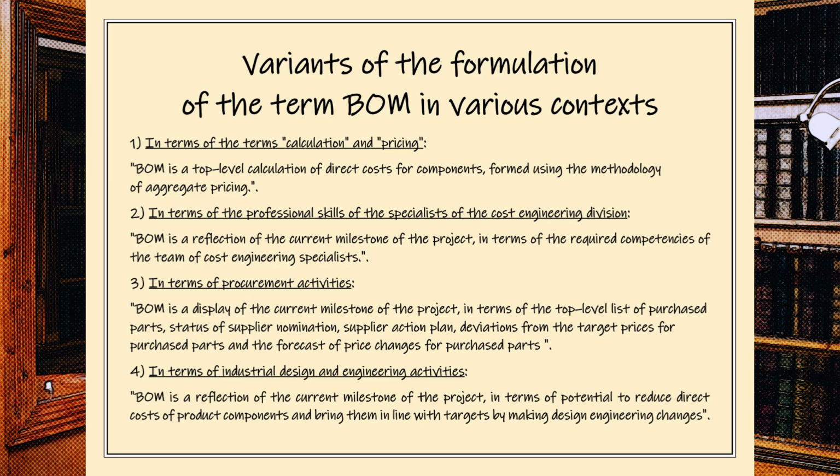In terms of procurement, buyers' activities, BOM is a display of the current project milestone in terms of the top-level list of purchase parts, the status of the supplier's nomination, the supplier action plan, deviation from the target price of purchase parts, and the forecast of price changes for purchase parts. In terms of industrial design and engineering activities, BOM is a reflection of the current milestone of the project in terms of the potential to reduce direct costs of product components and bring them in line with the target by making design changes to the product.